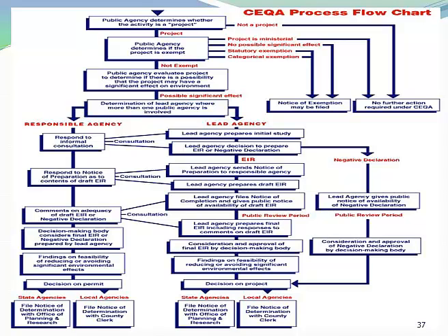And keep in mind that the analysis that we conduct as a department in the role of the responsible agency isn't just limited to the hazardous material sections. So when you see an environmental impact report or a mitigated neg dec or neg dec, and you're reviewing the assessment, look at the other areas that would potentially relate to your project, such as air quality impacts or transportation or geology or water, whatever the resource area you think your project might impact, and then provide suggestions for the agency to include an analysis of those impacts in their lead agency document.